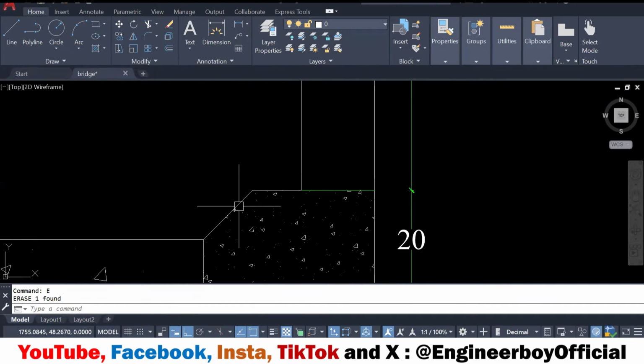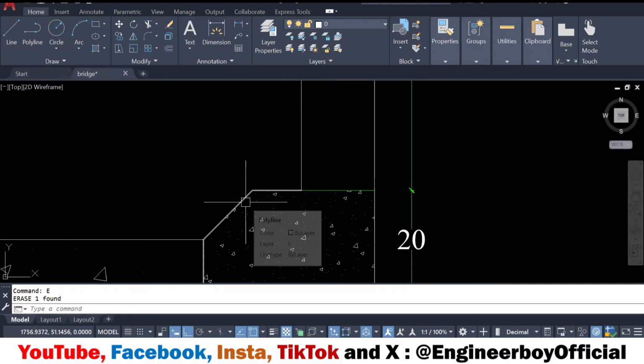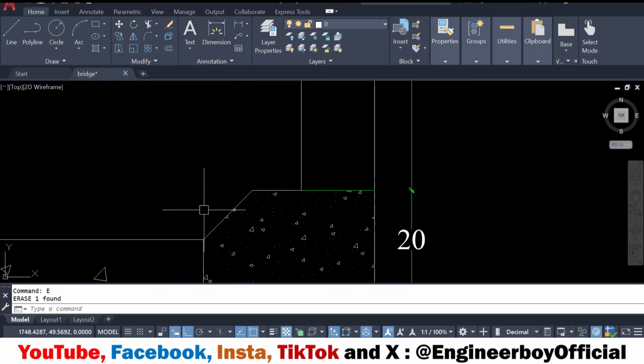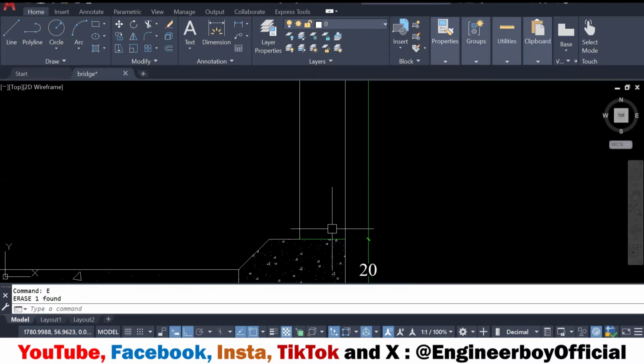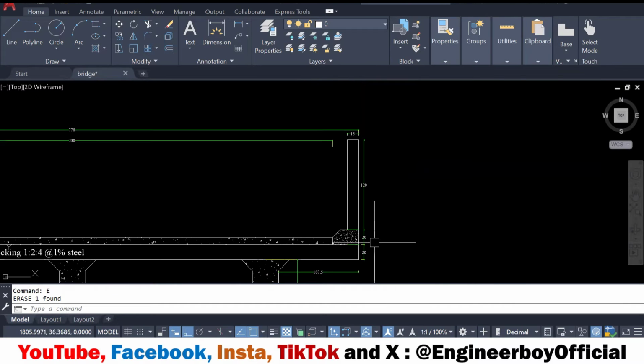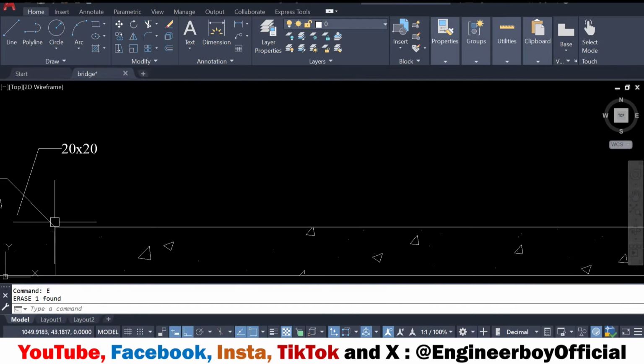We are ignoring this chamfer or some fillet conditions, because they are constructed and then pressed with the float maybe. So that's why they can be taken in the cross-sectional area. The length, if you see, this is 15, and this portion is 20, which becomes 35. You can see it.